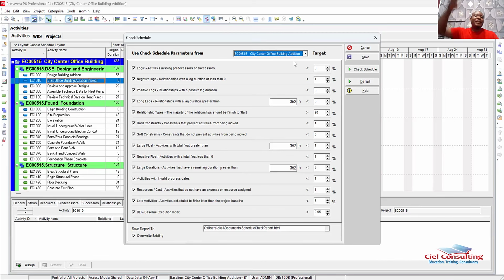So don't create a schedule without linking your activities or most of your activities. Because if we don't link it, we refer to it as a floating task. And if tasks are floating without a link, then of course the schedule in itself cannot flow. That's part of the reason why DCMA says that over 95% of your activities should have predecessors as well as successors.